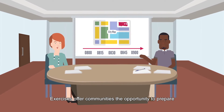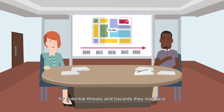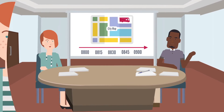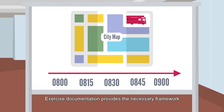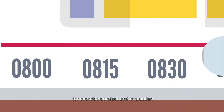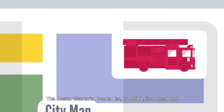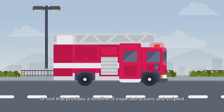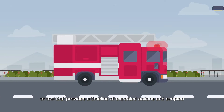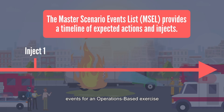Exercises offer communities the opportunity to prepare for potential threats and hazards they may face. Exercise documentation provides the necessary framework for exercise conduct and evaluation. The Master Scenario Events List, or MEASL, is a document or tool that provides a timeline of expected actions and scripted events for an operations-based exercise.